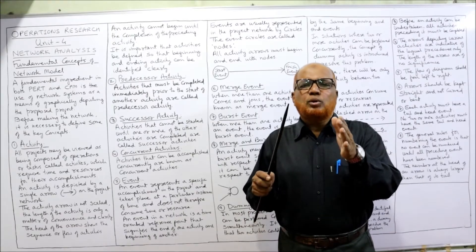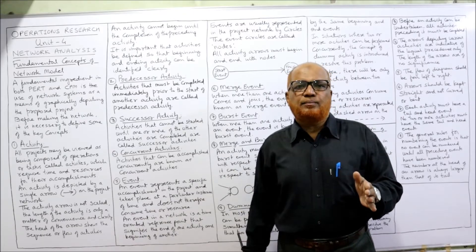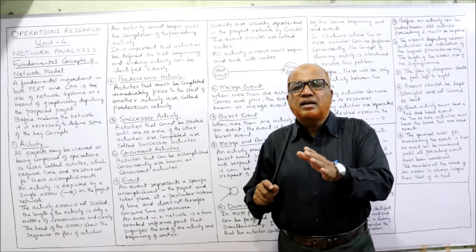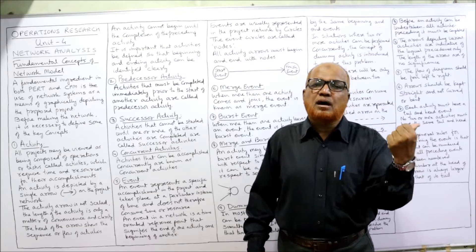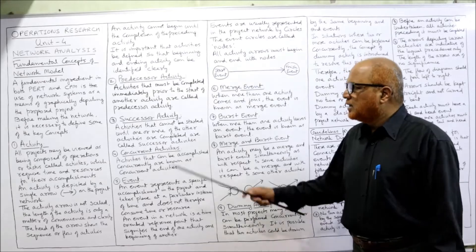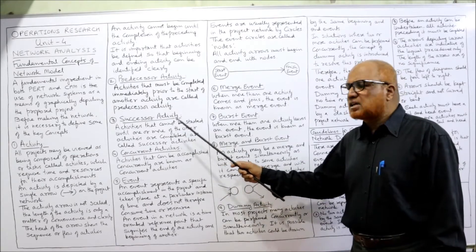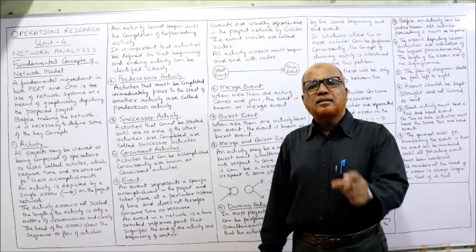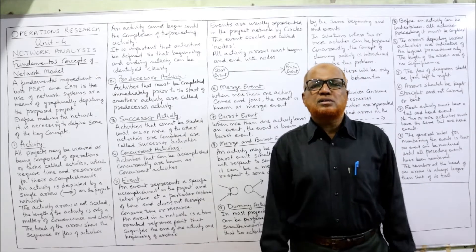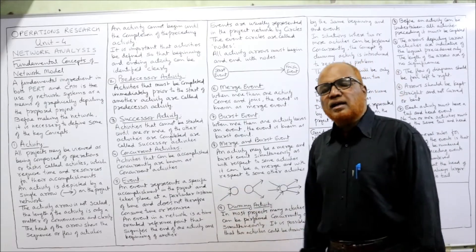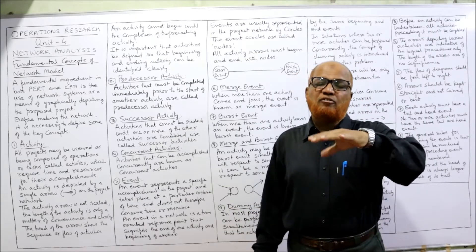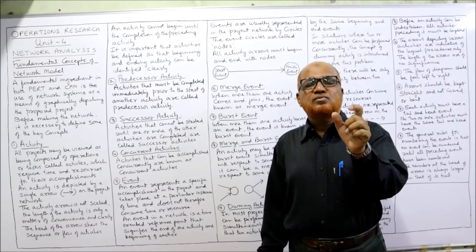Activities are classified into two categories: predecessor activity and successor activity. Predecessor activities are those which should be done first before starting the next activity — for example, activity A should be done first, and then only activity B can be done. Successor activities are those that cannot be started until one or more other activities are completed. Concurrent activities are two or more activities that can be done simultaneously.